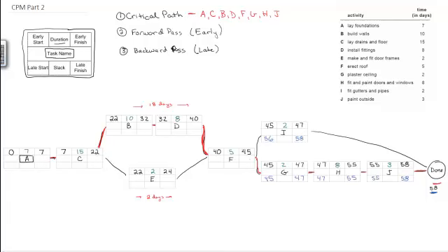Okay. Going back towards F, now I'm looking at these 2 numbers. So I have to start this one before day 56. I have to start this one before day 45, which means the latest I can finish F is going to be day 45. I can't wait until day 56, because if I wait till day 56, I've delayed the whole bottom row of my process.